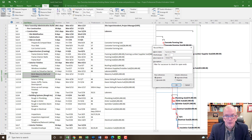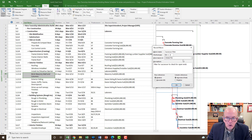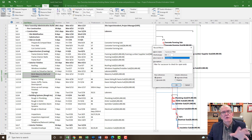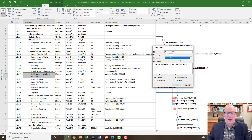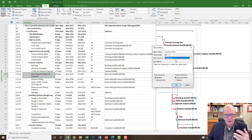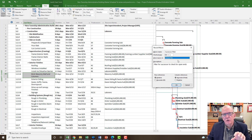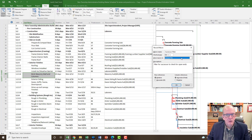I'll use L, so we've got Ctrl+L. It says 'store macro in global file.' You have a choice: global file or this project. If I pick global file, this macro will work in all my Microsoft Project files on this computer. If you pick this project, it'll only work in this project file — useful for big projects with unique macros. You can also share those project-specific macros when sharing the file, but you can't share global file macros that way. I'm going to leave this at global file.